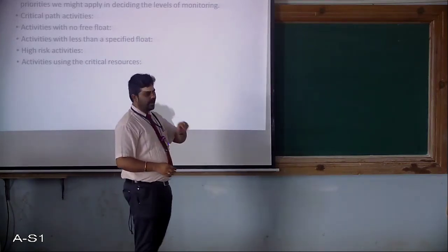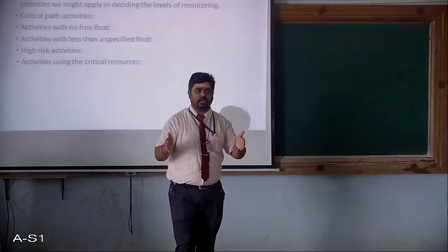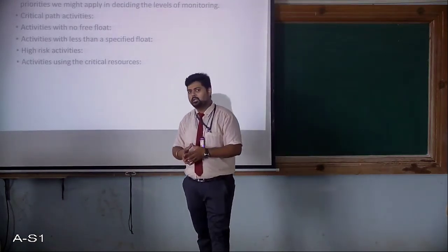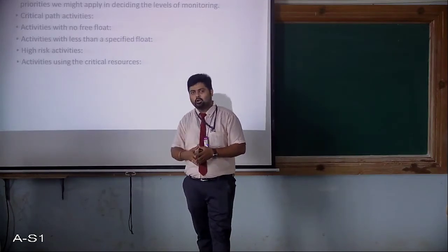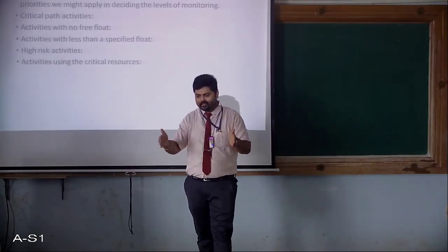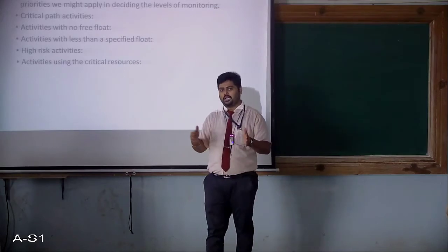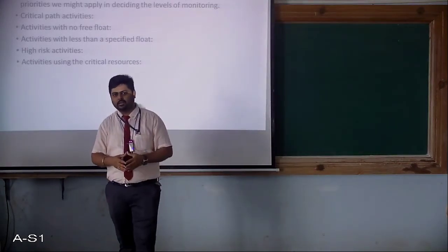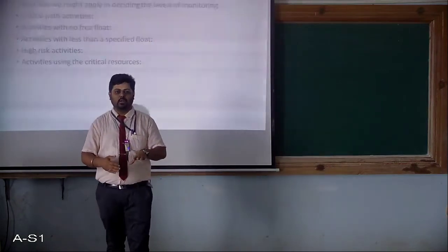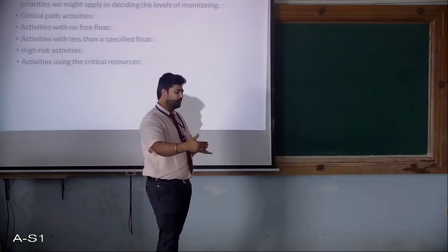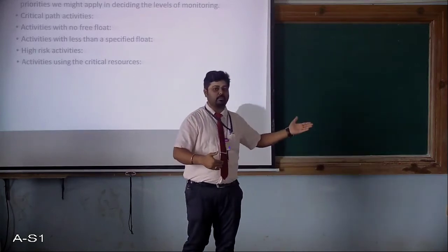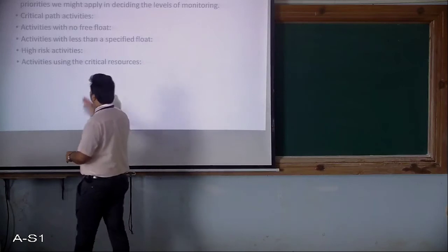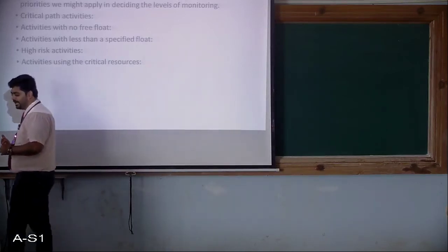So critical activities means no span of time or buffer time will be given to do this stuff with that particular project module. You have to be very strict and you don't have any buffer time to complete those activities. Two months means you have a dedicated two months to complete that module. If you delay it to 2.5 or 3 months, your complete project may get delayed. Such activities are your critical path activities.